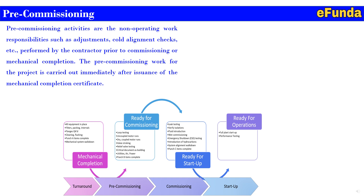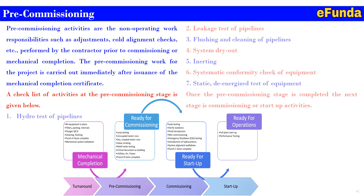Ready for startup includes leak test, verify insulation, fluid production, wet commissioning, emergency shutdown (ESD) testing, introduction of hydrocarbon, system alignment walkdown, and punch C items completed. Finally, ready for operation covers full plant startup and performance testing. A checklist of activities at the pre-commissioning stage includes: hydro testing of a pipeline, leakage test of a pipeline, flushing and cleaning of a pipeline, system dryer, inner team, systematic conformity check of equipment, and static de-energization test of equipment.